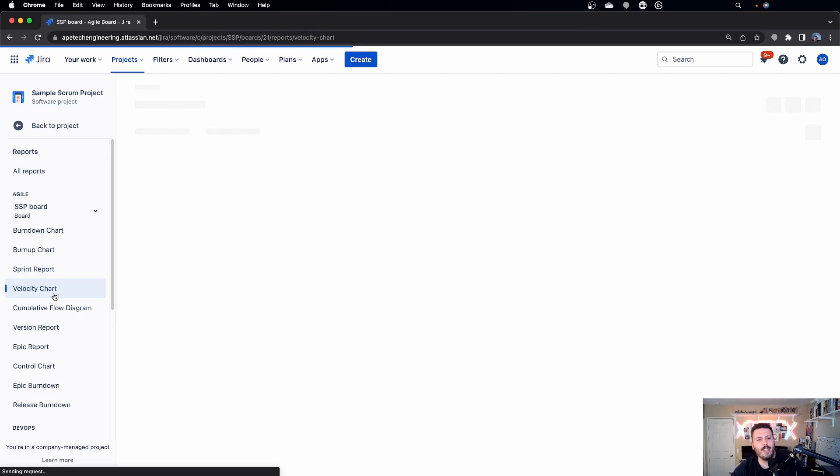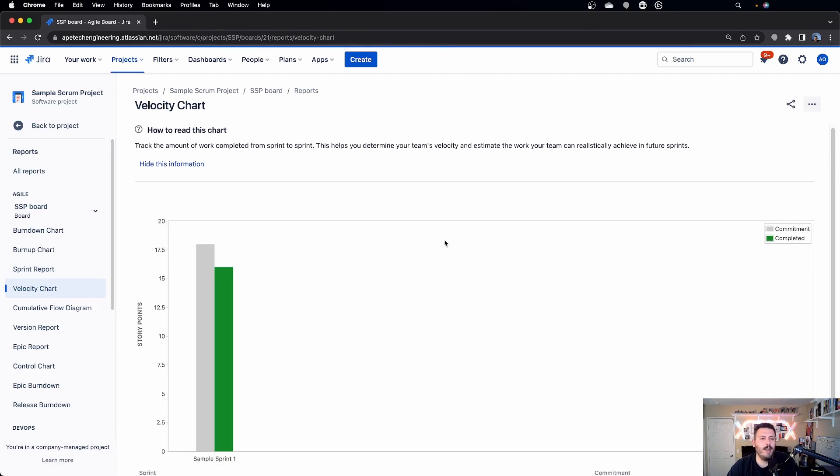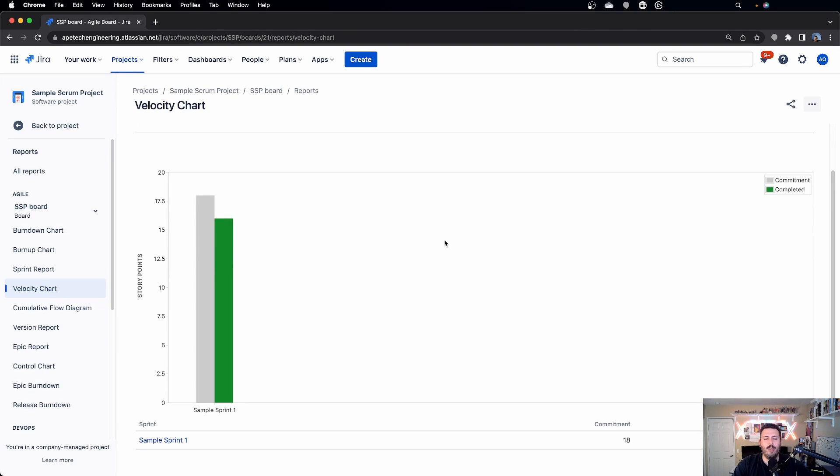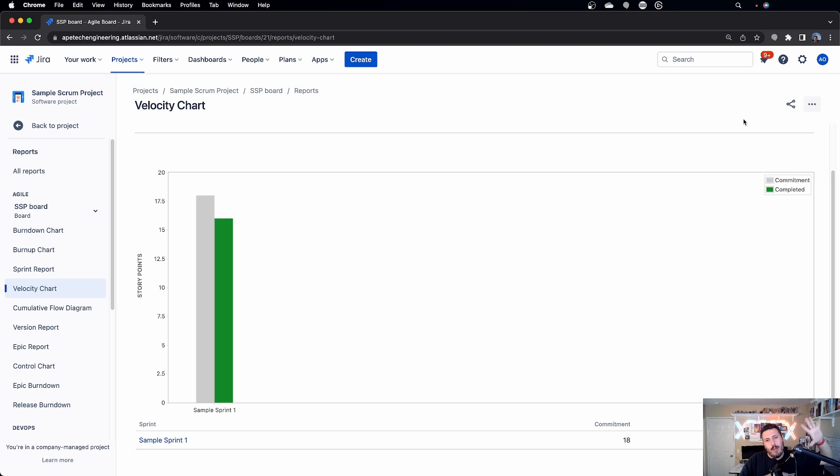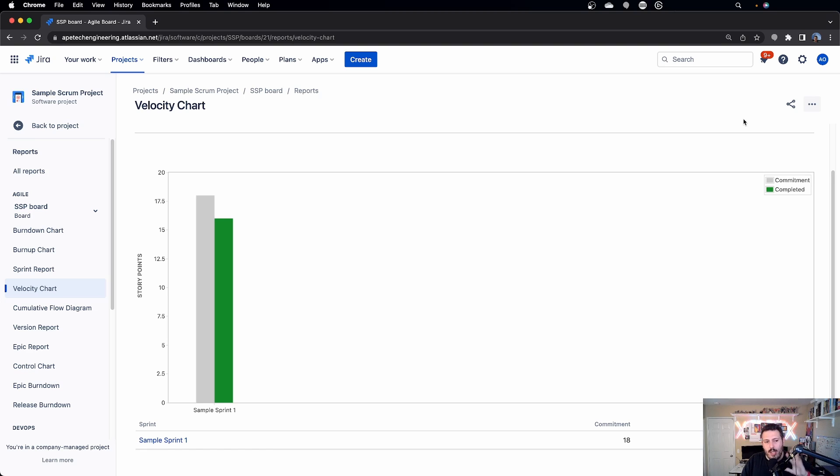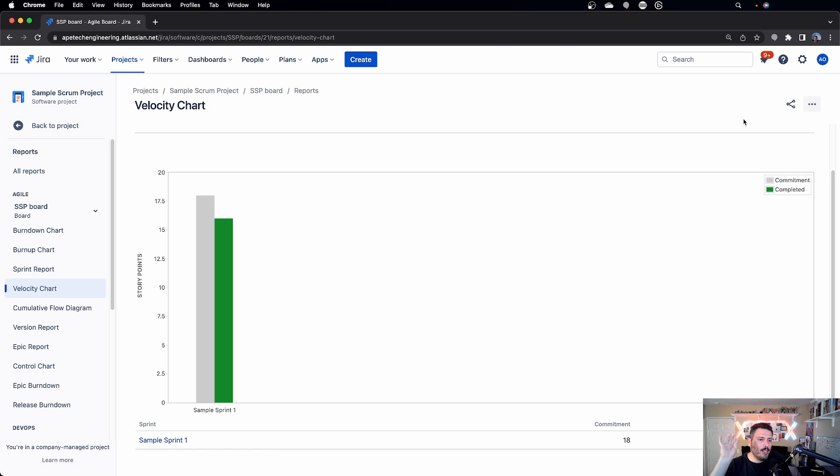Let's talk about Velocity Chart. I like this one. This one's a really cool and interesting chart as well. You get some value out of it, and the biggest value you get out of this one is that it will highlight, it will basically show you what your team committed to when you hit that blue start sprint button versus what your team accomplished when you hit the gray complete sprint button.